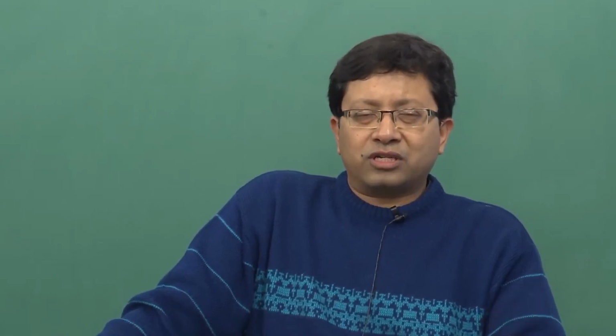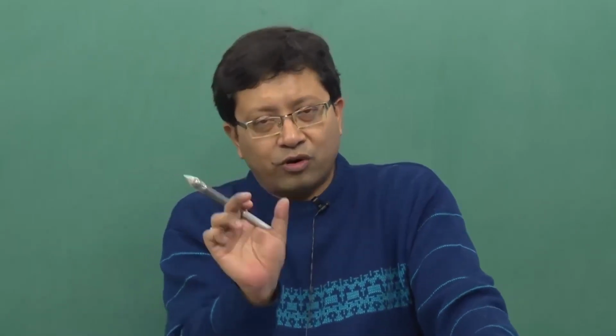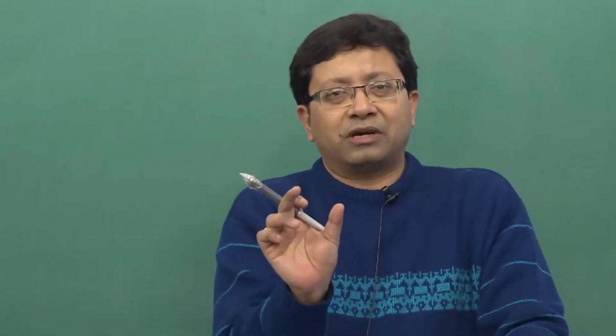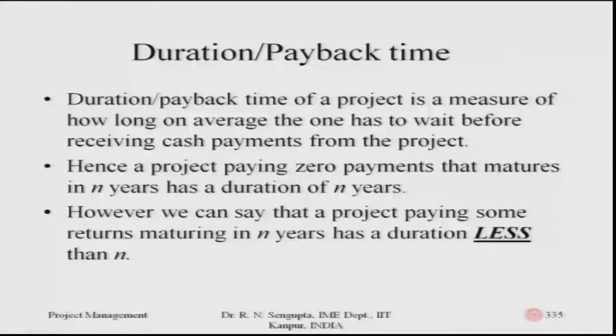Consider the IRR. IRR, if you remember, is the internal rate of return, that rate such that the net present value becomes 0. So, what I want to find out is the duration such that, depending on whatever the inflows and outflows are, I am able to get back within the time frame the overall amount of money which has been invested by me, considering outflows and inflows in a cumulative sense.